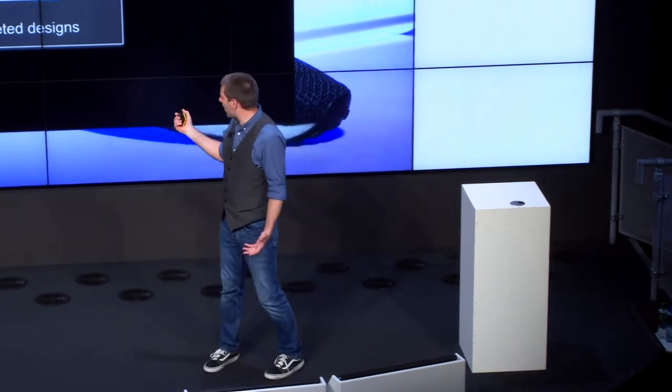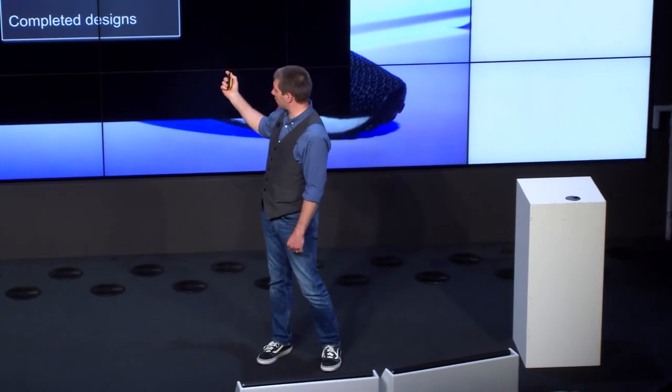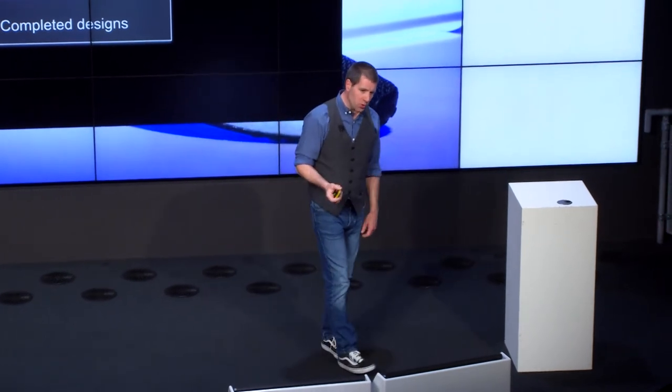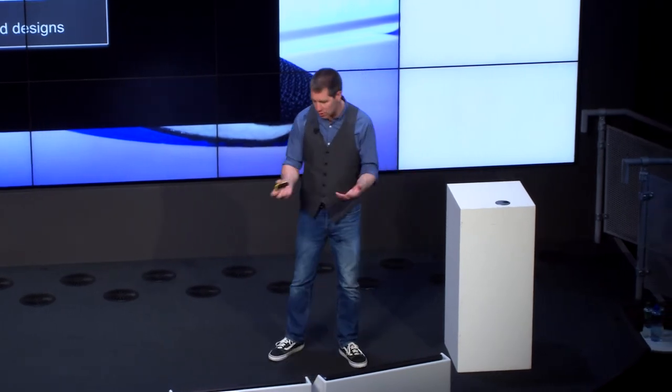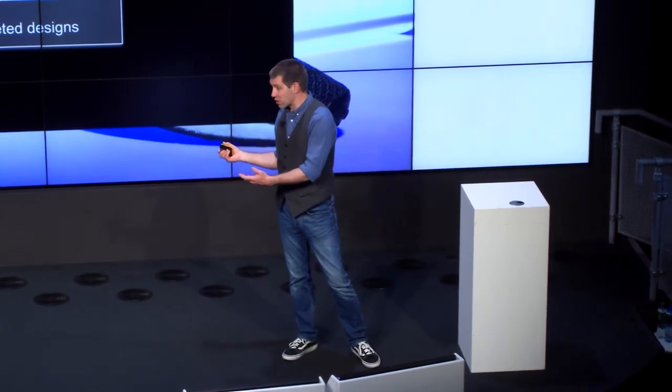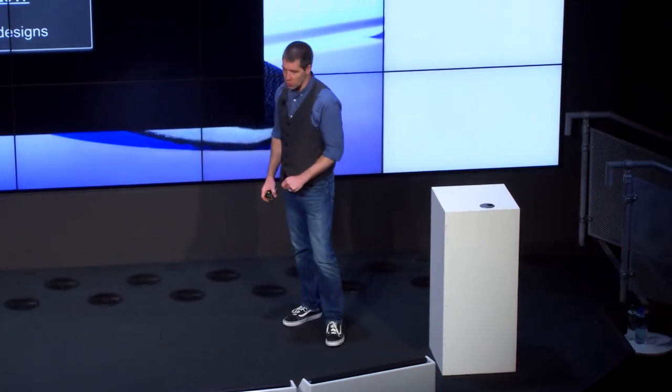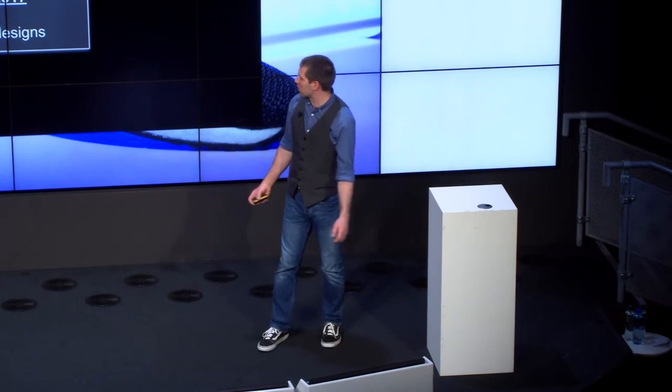November was when the new platform was going live, so that was a bit of a busy time. We couldn't get on building this until after Christmas. It's such a peak time for us that we need to make sure there's capacity in the websites. There's a lot of load testing, and the new platform had to be able to cope with that. I have to say, the new platform project worked a treat, it scaled and it was a great success.